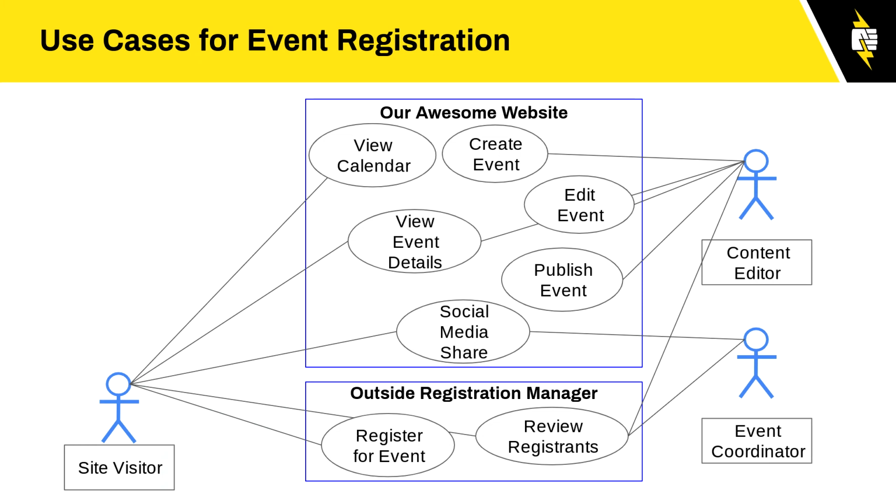And again, we're not talking about the upgrade specifically in here, but about the functionality that needs to be in place at the end, right? From here you could easily prioritize what's the most important. Which pieces are for MVP? Which of these stories are MVP? And you could highlight those and then determine from those.